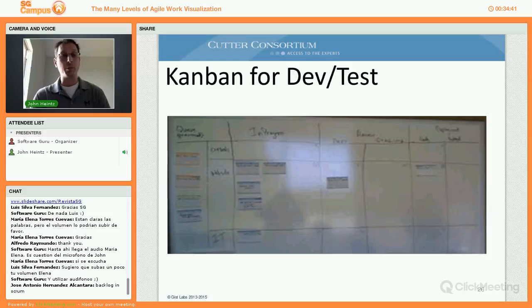Here is a blurry example from one of the original Kanban boards that I worked with a team on. This was a team that was exploring their style and their workflow. This team had 3 different types of work: IT work, website work, and infrastructure work, where they had a process set up where work was in progress and then in review. The review stage included the broader organization beyond just the development team. And then items were ready for deployment into production. This was one of the original Kanban boards that I myself worked on with the team back in 2007.